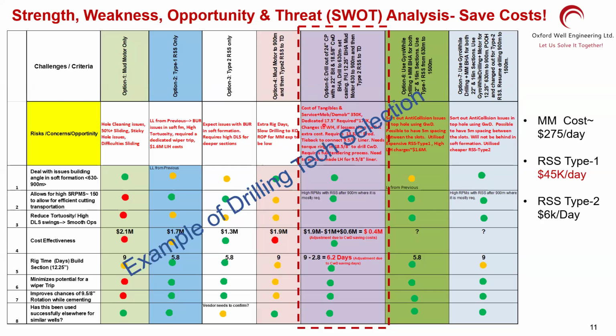You can say, okay, I'll go with this one, and then you have a starting point. Then you have a number two. Option number two could be this one, could be that one. So you have three options out of it. You put everything on the table: the criteria, the risk profile, the options you already have, and the selection of technology.